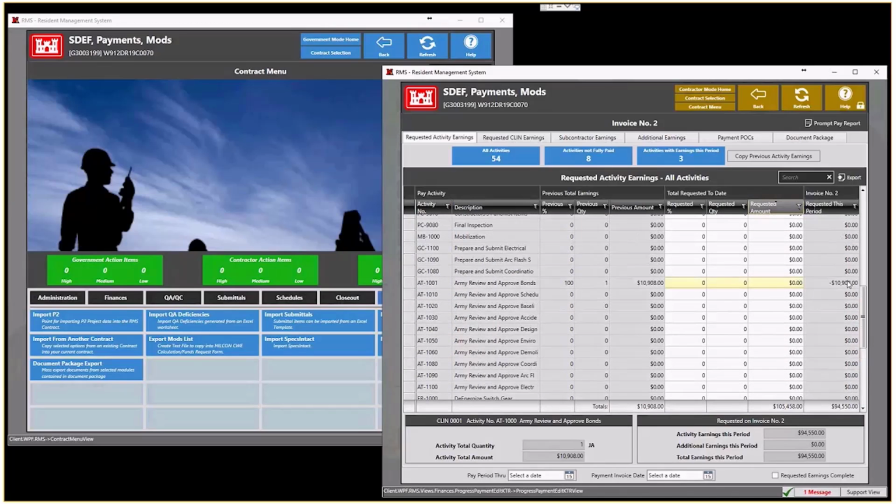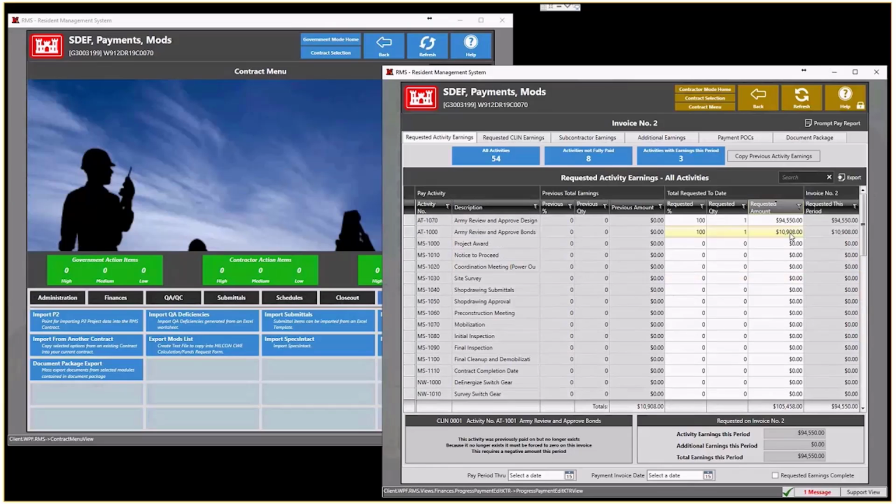This negative amount is from this activity that was in my previous payment. Because this activity is no longer included in any future payment, I've got to take the money off of it that I already paid on it and put that dollar amount on another activity that the scheduler is now using. This is one way to correct these negative values.